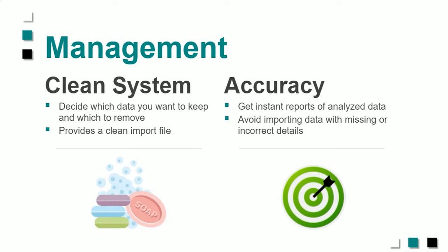Keeps your P6 clean. Okay, so in more than one case, we've seen a calendar get clobbered by somebody else's calendar just because the name happened to be the same. So these are things that you don't want because it can change the output of your schedule. The dates can start changing. So that is something that you avoid very easily now with the scrubbing approach. And then I already touched on the reporting, how quick that is and how easy that is. So that's really a key thing.